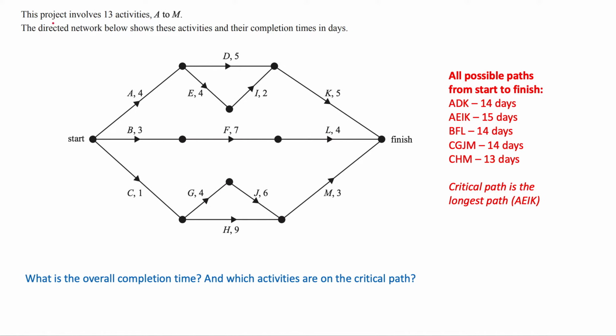So as we go through, firstly, I'll highlight these one at a time and I can just draw them onto the network. The possible paths from start to finish, when you work these out, I actually like to go from top to bottom. So I think about the highest path you can go. There's no logic to that. It's just to keep track of what you've already covered.